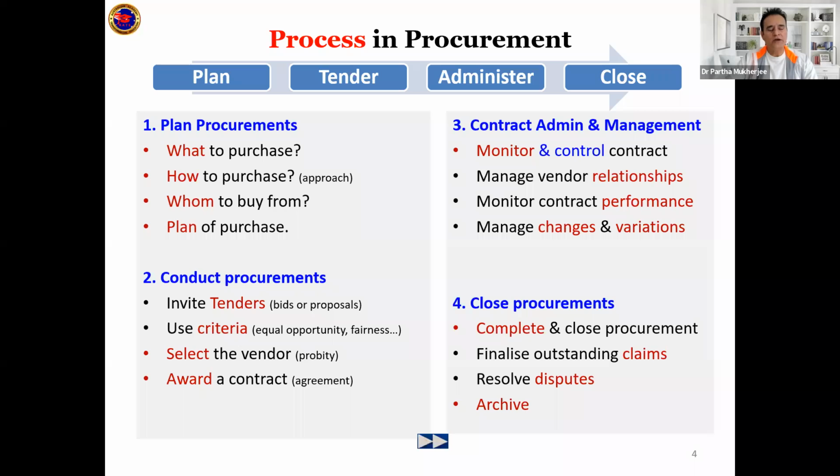Normally you will have extra sand, extra cement, extra tiles and whatever else, and you would like to return those and get some money back. Also the team, you need to tell them what they need to do next. Especially for the contractors, all the invoices and bills will have to be paid off. From the project management perspective, at the closing, you will settle all the disputes and archive everything.